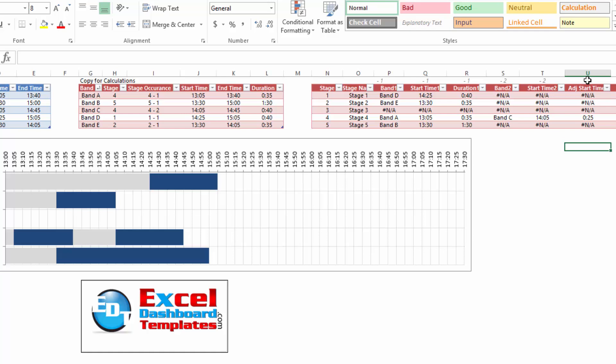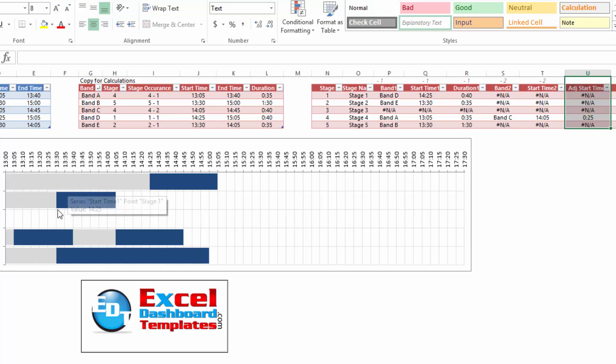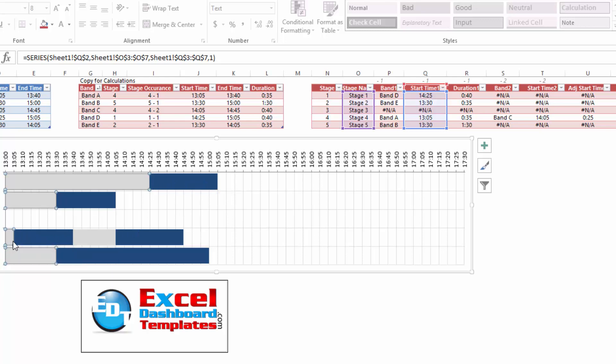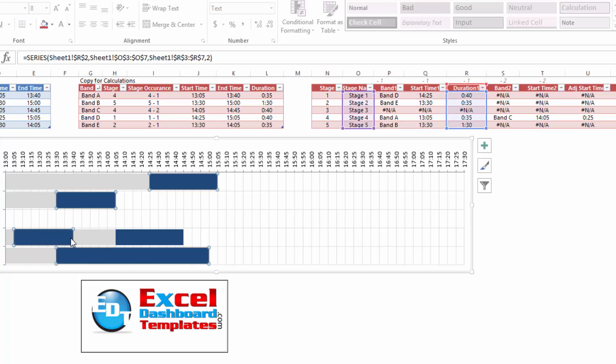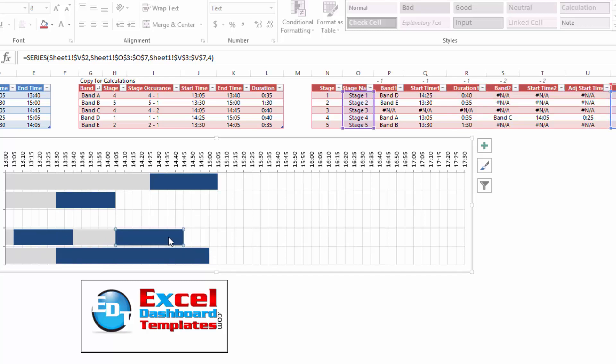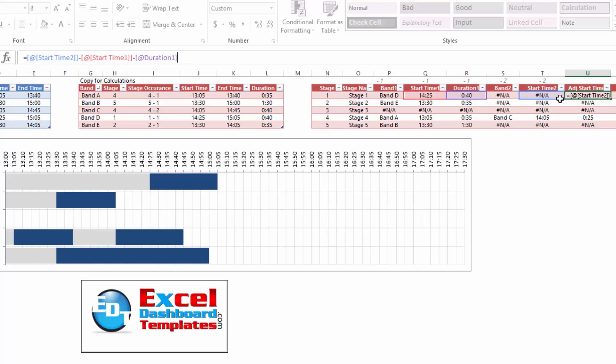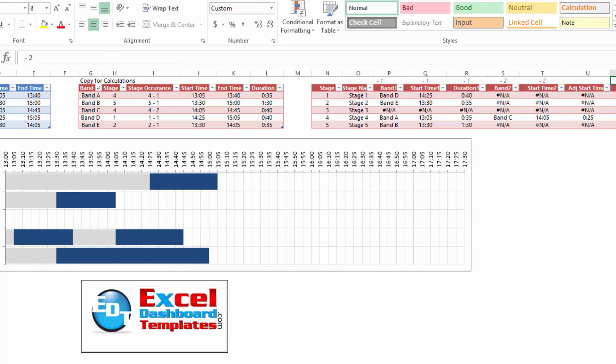Now, we do have one new column in here that you're going to see and this is adjusted start time. So just like let's go ahead and take a look in our chart down here. In stage one, we have a start time that doesn't start until out here and then we have a duration. Well, when you have two bands, you're going to have a clear fill area here. You're going to have the first band's duration right there. You're going to have to have another clear fill area until that second band starts. So that's what this adjusted start time is here. And what he is doing is he is subtracting start time two for band two from start time one of band one and then subtracting the duration. So once again, the beauty of this is that you can now expand as many bands as you want.